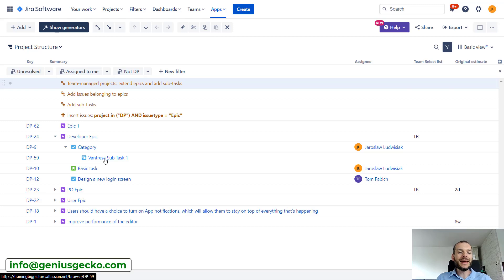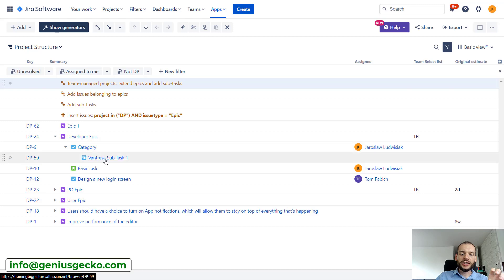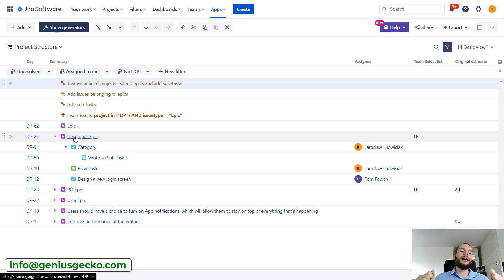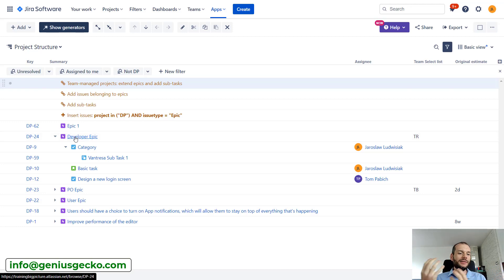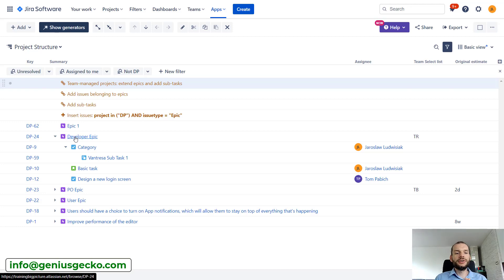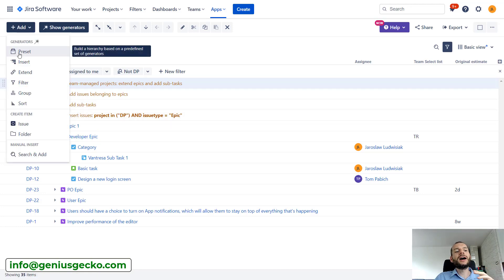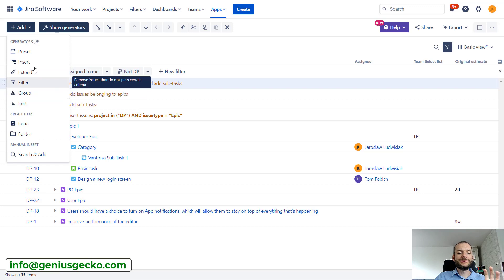But in many cases, hierarchies that we want to build are way, way more complex. For example, three levels of hierarchy may not be sufficient. Maybe we need a higher level element like a feature and this feature will be delivered by several epics, so we need to deliver several epics so that the feature is complete. Or maybe we have tasks spread over several different Jira projects. Usually for that, the presets are not sufficient.